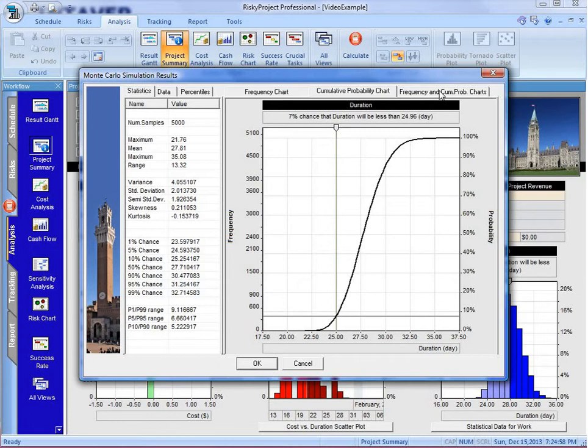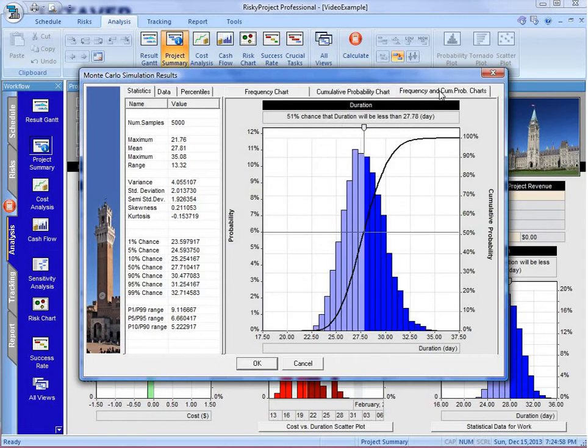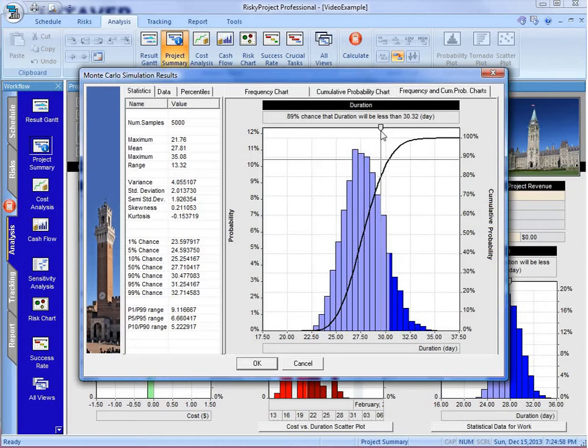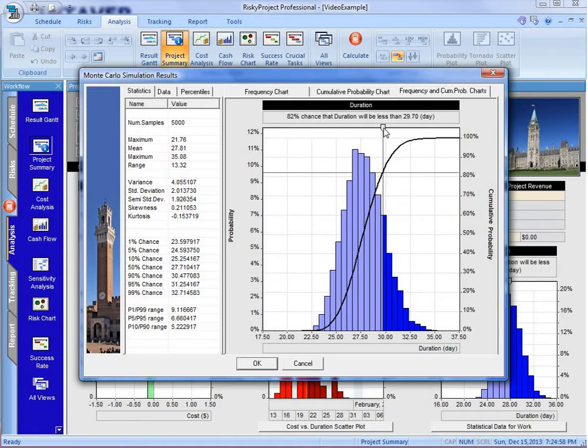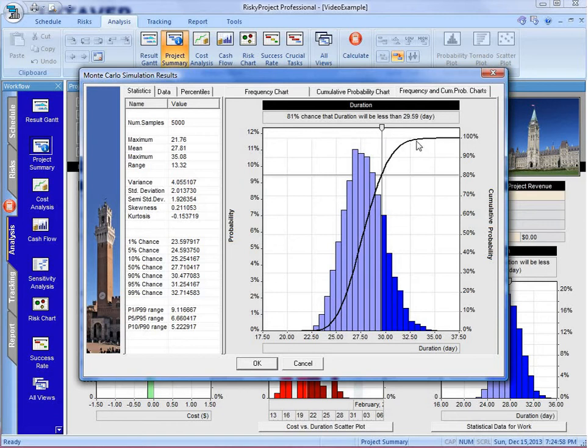What I like to use is the combined frequency and cumulative probability chart. We might want to go and take a look at what our P80, which is a good measure of where we might set your contingency at. We can see our P80 is around 29 and a half, let's say 30 days.